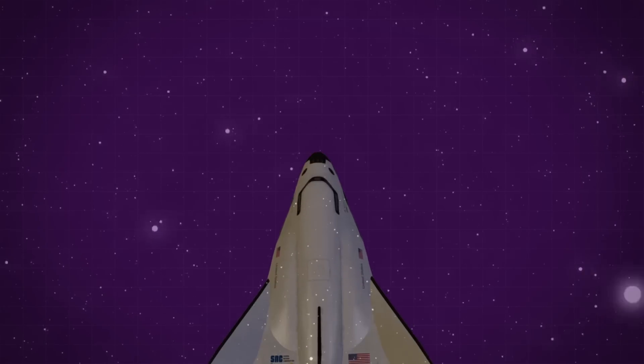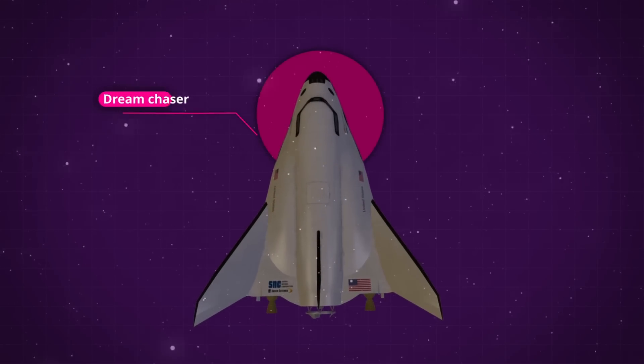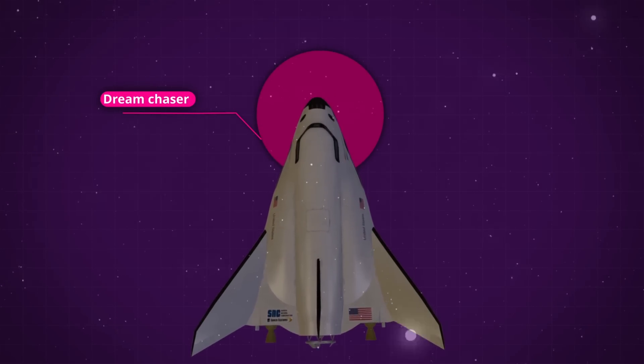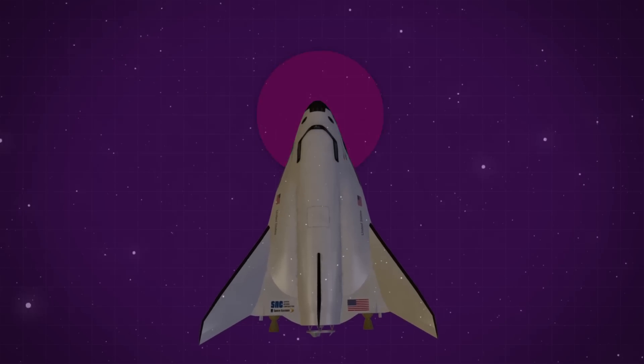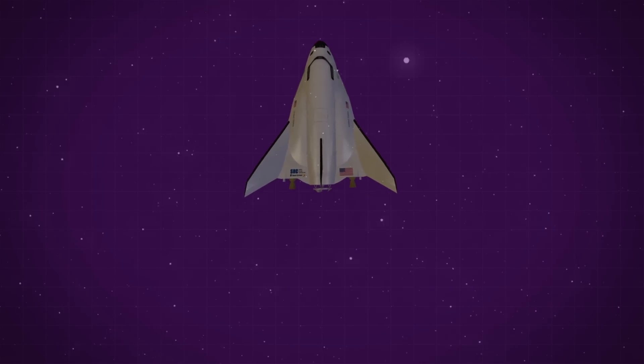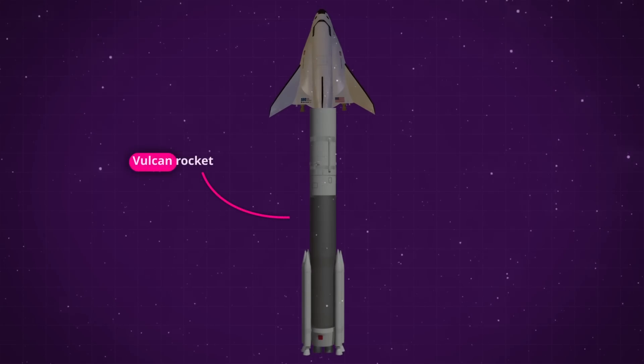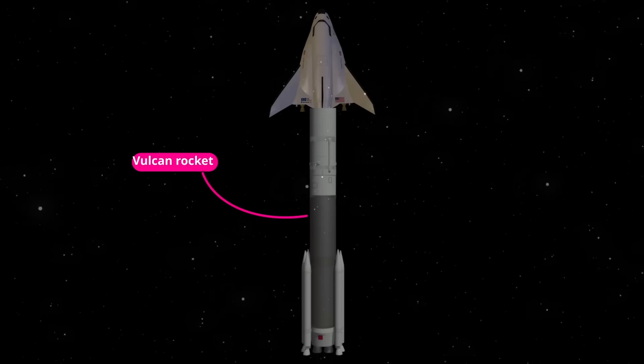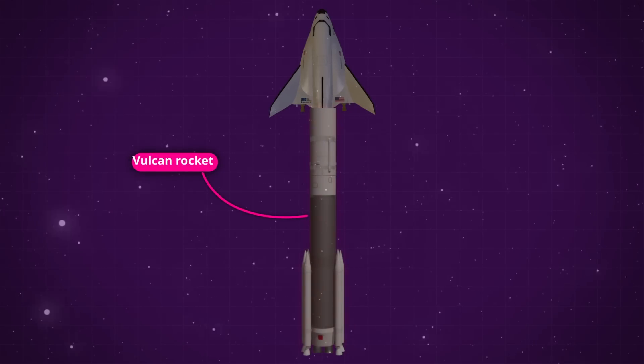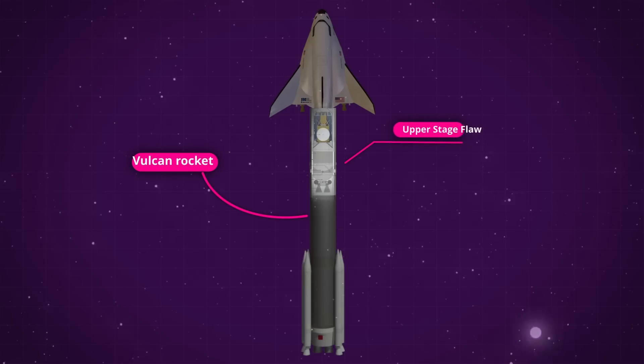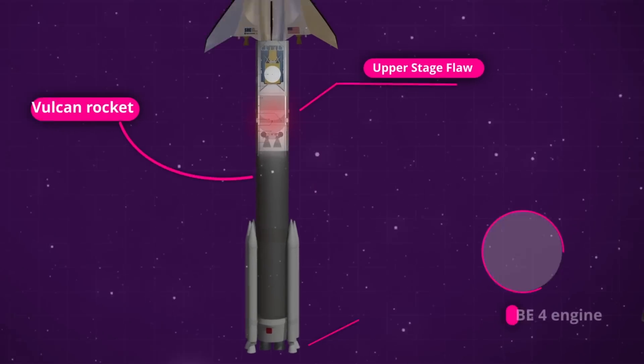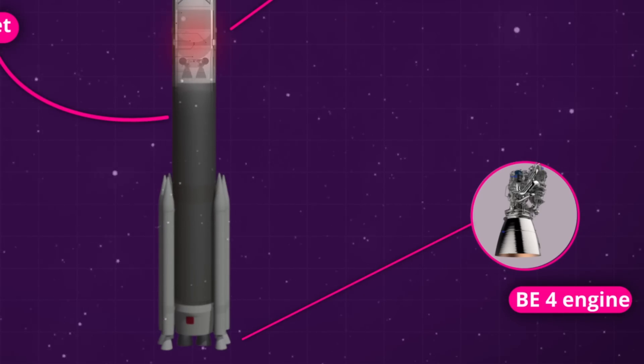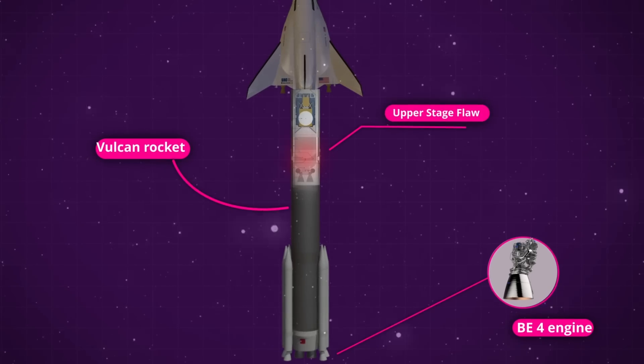The Dream Chaser is very close to being operational, their first completed ship, the Tenacity, could have even made its first mission to the ISS by now if it weren't for delays with the Vulcan rocket from ULA. Sierra needs this new booster to get Tenacity into orbit, but ULA has run into some pretty major setbacks, largely due to a structural flaw in the rocket's upper stage, but partially also due to Blue Origin's exploding BE-4 engine, so again, circumstances beyond Dream Chaser's control.